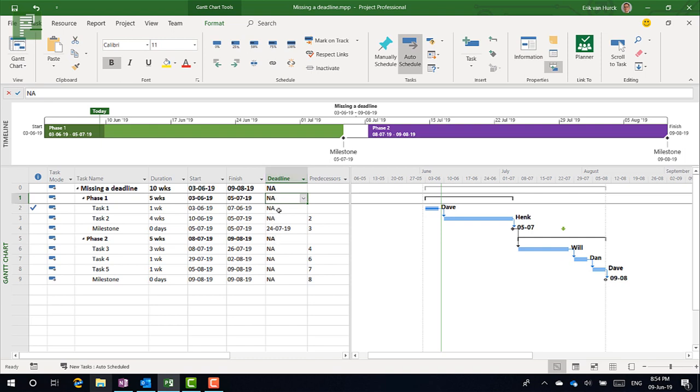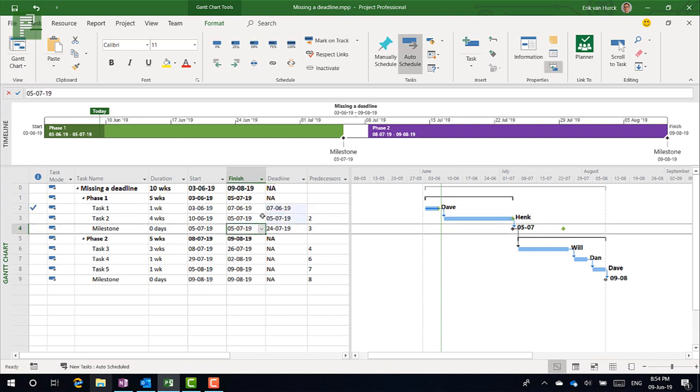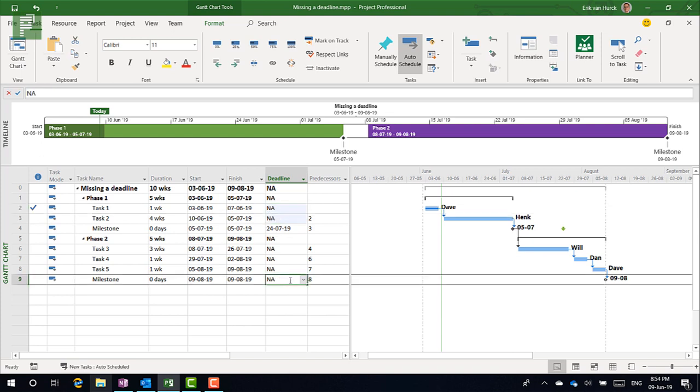Now for most of these tasks you don't see a deadline, and it is best practice to limit the amount of deadlines in a schedule. Only the very, very important things that come from an external source should be in here. So it's not suitable to have these two dates here as being also deadlines, because every time you surpass that, then there's an immediate alarm bell going off. You don't want that, or I can imagine you don't want that. So let's set this one down to roughly a week earlier.